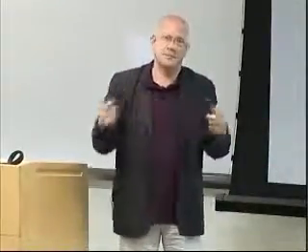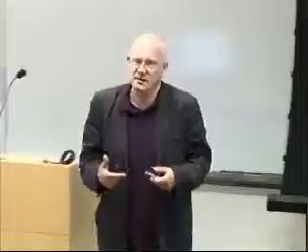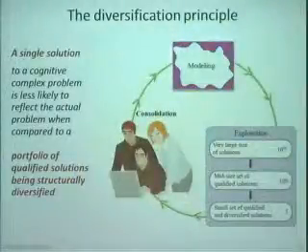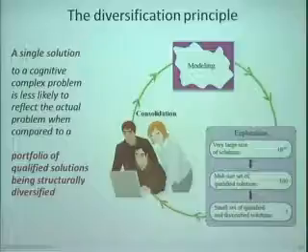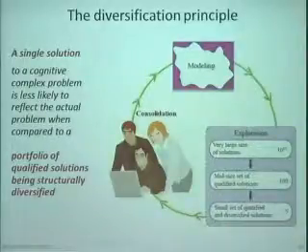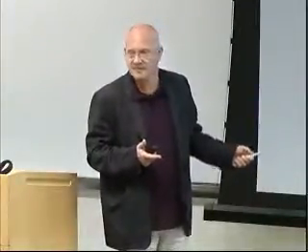We offer the user for this interactive process a portfolio of qualified solutions. So it's a portfolio. In our case, it's 5, what we are offering, and it's qualified. So that's really something qualified against the stated utility function, which I just explained to you. And what it means also, we are starting with some modeling. We do some exploration. That is, in a way, the science part. Remember, this is about art and science. So we start with, I just made here a number, 10 to the power of 12. This is for a relatively small release planning problem with, I think, 25 features and planning 3 releases ahead of time. We end up combinatorially in this large size set of solutions.